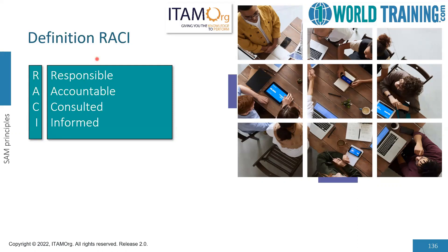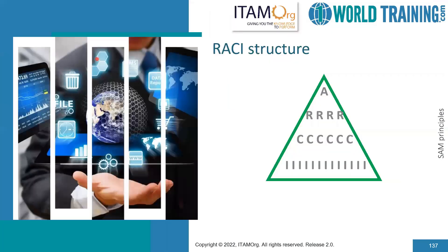Accountable is usually one person only who has the ownership of the process and the result from it. Consulted means those who are consulted and whose opinions are sought — they might provide input based on their knowledge and expertise. Informed means people who are kept updated on the progress of the service and receive information about the process execution and quality. There is only one person always accountable; accountability cannot be shared or split, but we can have more people in R, C, and I.